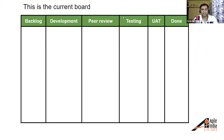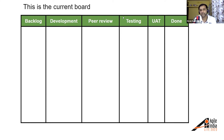My question is: this is the current board the team is using — is this a pull system, and if not, why not? Feel free to ping a short answer in the chat. We have an answer coming in: it does not have WIP limits. Yes — it's not a pull system.